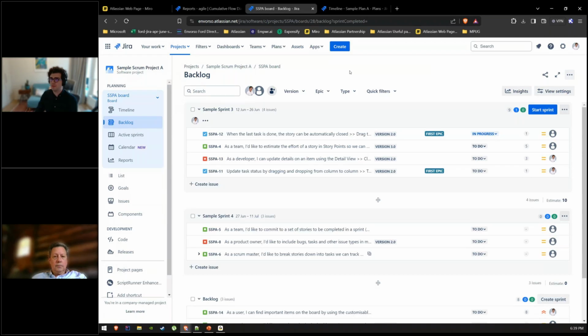Now, there are other Scrum meetings, like the sprint retrospective, which is to improve the process. We're not going to go into that. I'm going to go all the way to the sprint planning session. The sprint planning session happens at the beginning of the sprint, where you look at what your team can achieve in the next sprint, the next 2 weeks.